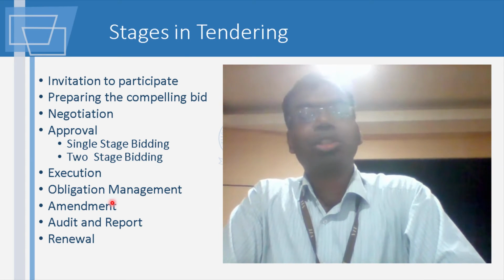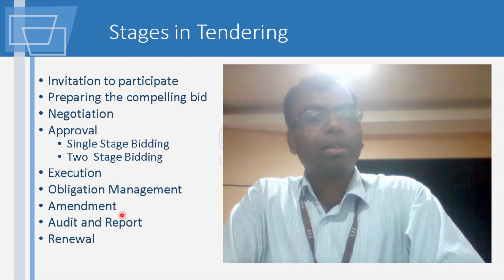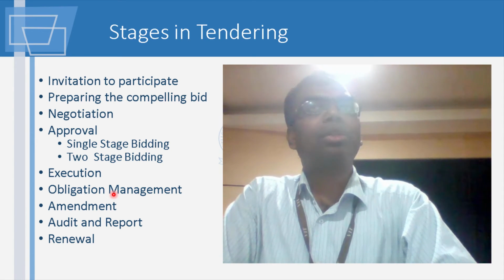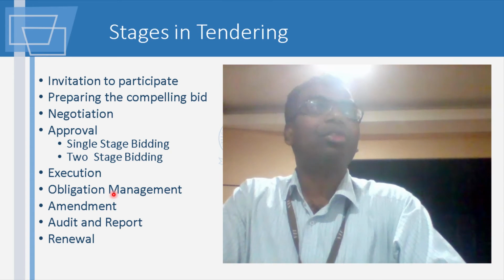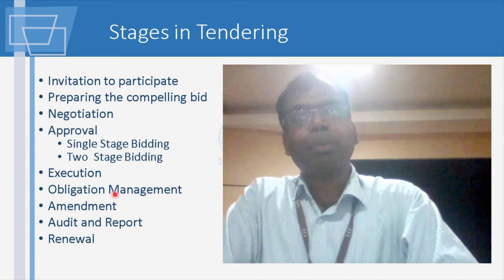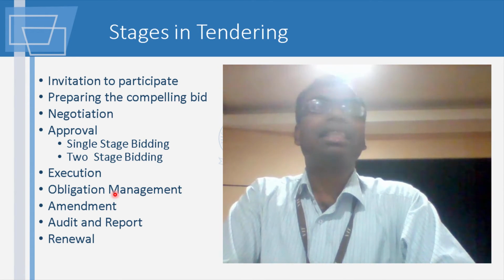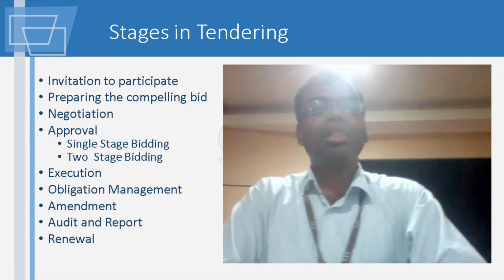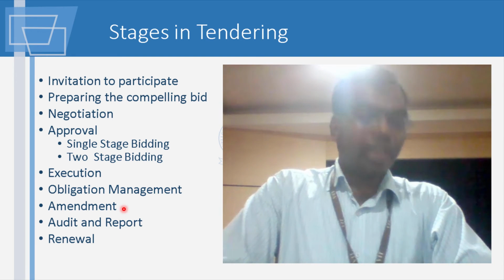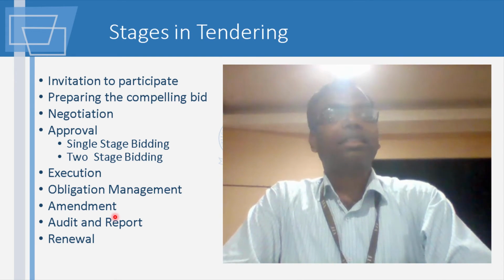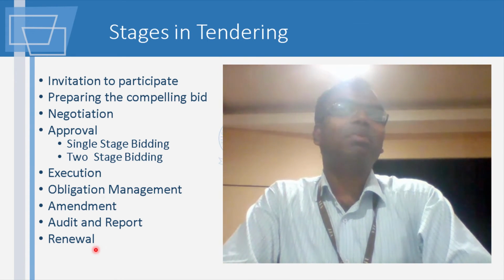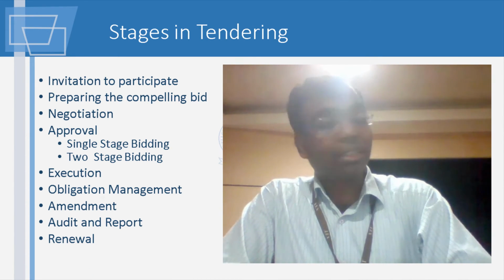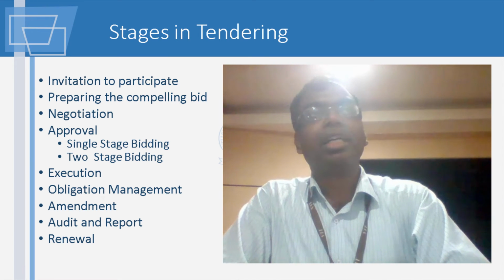Then there is the execution of the job. There is an obligation on the part of the buyer to give the contractor enough space to work, also pay the money in time and get necessary permissions, and the contractor, on his part, should do the work in time. Then there might be some amendments. Why are you only looking at this? Please add a little bit of greenery, do a little bit of landscaping work. It's a very common request in a project.